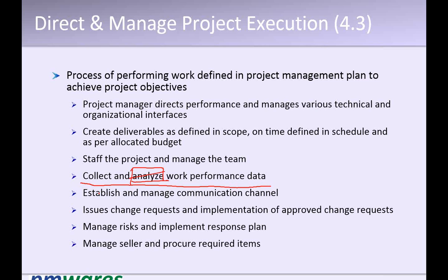When a deliverable is in progress, at that time if we are reviewing it, this is part of execution, that is quality assurance. When the deliverable is complete and now we are checking whether the deliverable is right or wrong, then it is quality control, that is a part of monitoring and control. You got my point, right?